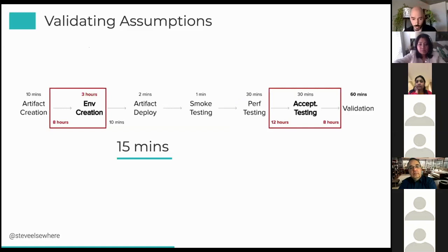And this is a real life example from a previous client where they were about to spend millions and millions of dollars on automating deployment. And luckily they brought me in to do the value stream mapping, because we highlighted these other opportunities that are going to save them a ton more money and aren't going to require millions of dollars to be flushed down the drain to save a few minutes. So it can be really valuable when you're looking at where you're going to spend your time and where you're going to spend your money.